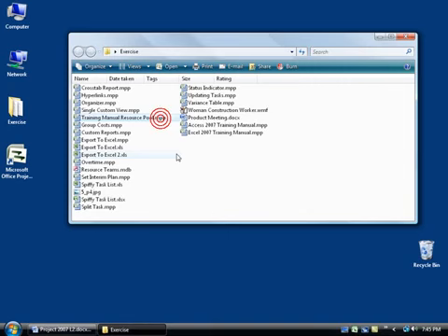So having a resource pool eliminates the need for project managers to re-enter resources in one or more project plans. Also, it'll keep the sharer files, in other words these files that the pool is sharing with, centralized so they're all pulling from the same resource pool. That way they'll be consistent and a current source of resource information, and it's going to help prevent over-allocation.